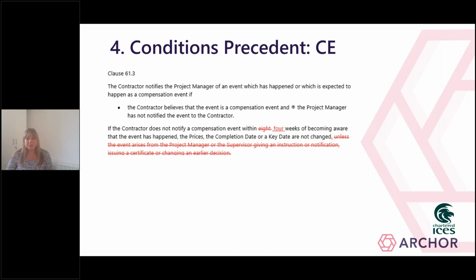I'd also suggest that project managers are aware of the requirements that must be met before changing the prices or the completion date, to avoid any arguments of waiver, for example, if changes are made despite the contractor not complying with these strict condition precedent clauses. This will help the client's position later on down the line when us lawyers get our hands on the dispute.